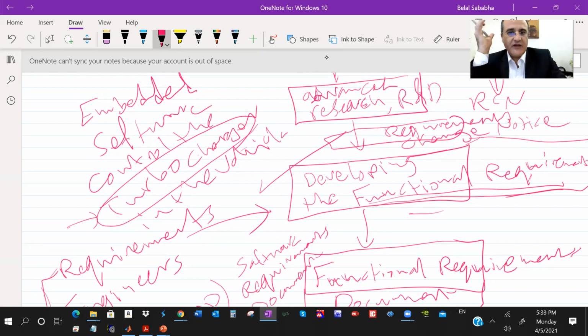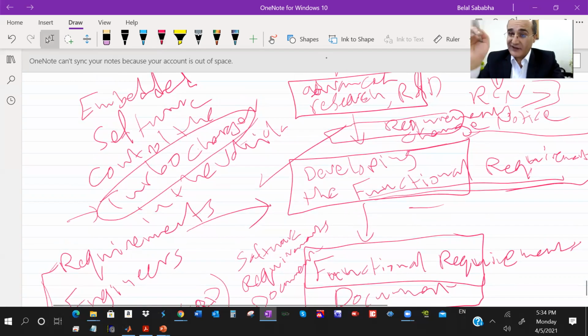Requirements change notice, we used to call it RCN in industry. So you submit an RCN, you ask to modify the requirements of a certain software, or even to create requirements for software. Because when you want to control the whole engine in the car, how many software models do you want? One model for controlling the gas injection, one to control the turbocharger, one for the onboard diagnostics, or a few together? So technical management needs to meet, understand what you are trying to do, and approve the software product you're going to produce. A managerial thing, but an important, technical managerial one.